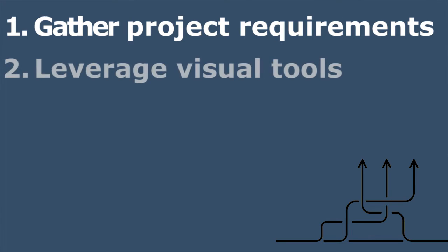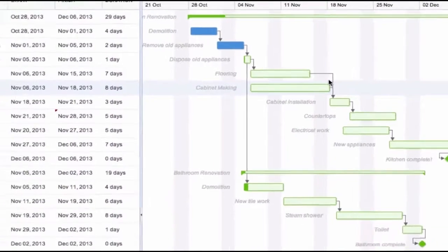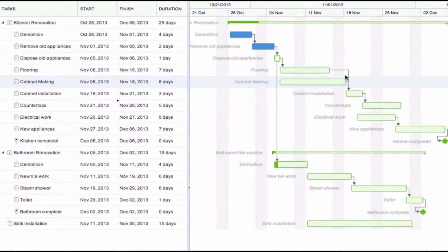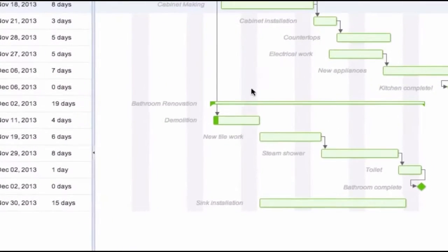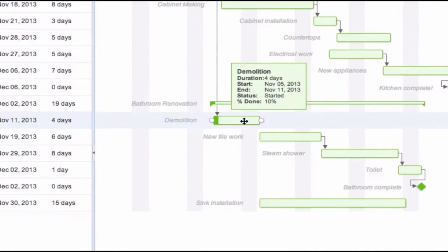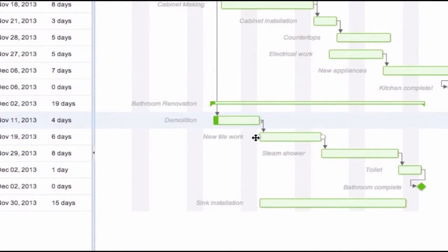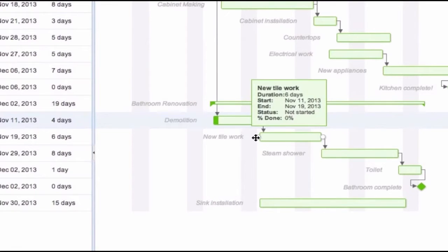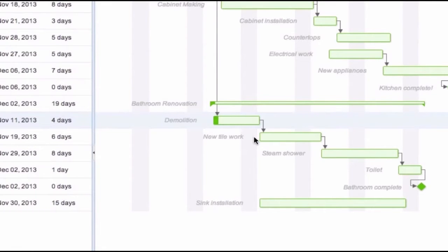Next, leverage visual tools to outline the project's critical path, so stakeholders better understand what can be delivered within a set time and budget. Gantt charts, like Mavenlink's for example, illustrate a project's critical path. This makes it easier for stakeholders to visualize how different tasks and phases within the project relate to one another, and how long they should take.